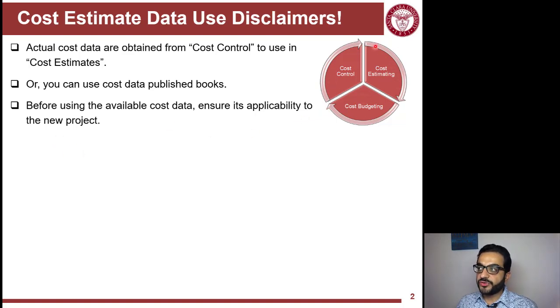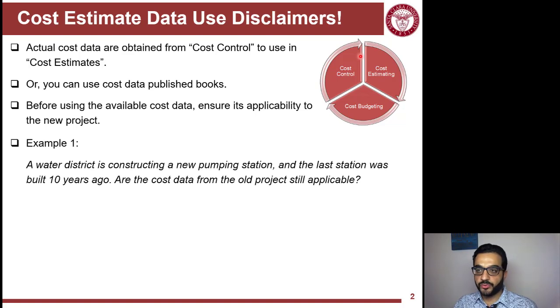But we see here this is a cycle, so you reuse or recycle the cost data that you have from previous projects. But before you do that, you have to make adjustments to account for differences between previous projects and the new projects. So this is an example here.